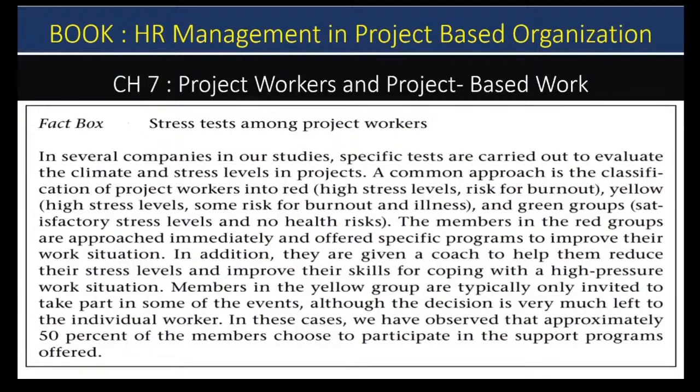So, in several companies in our study, specific tests are carried out to evaluate the climate and stress level in projects. A common approach is the classification of project workers into red, yellow, and green groups. The members in the red group are approached immediately and offered a specific program to improve their work situation.